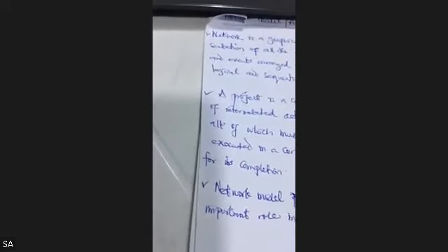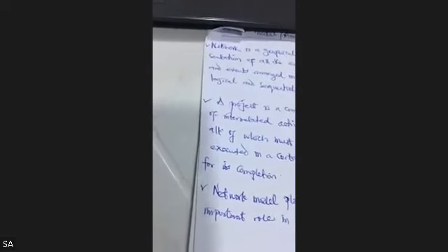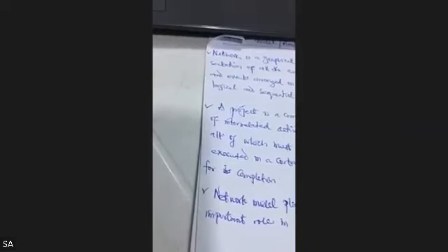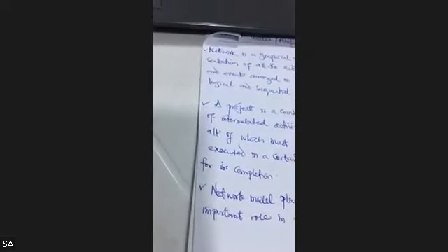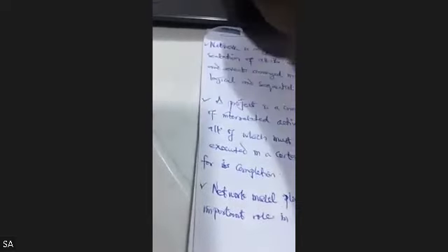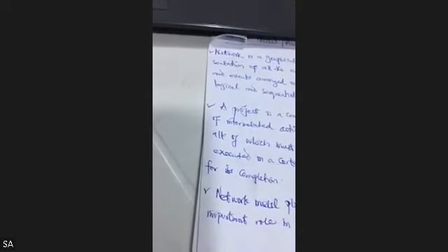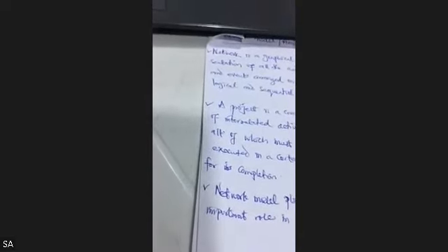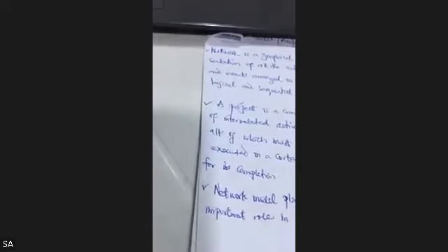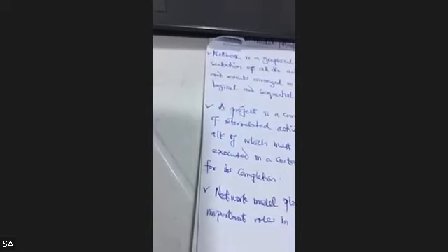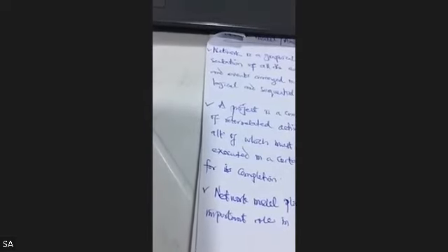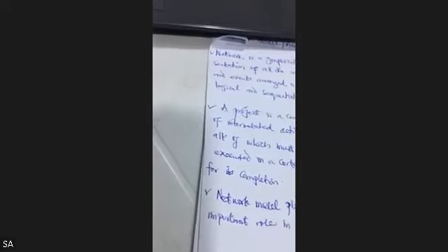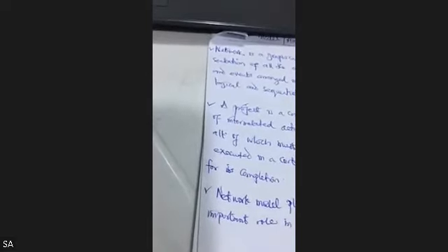For instance, for the question we want to solve tonight, we need to know which activities precede, that is the predecessor, which comes before, and which activity succeeds, that is, comes after. So this is very, very important. Then, next, very importantly, you draw the network. The network here is the CPM. You draw the network that is connecting all the activities. Take note of this. Each activity you are drawing or connecting should have unique event numbers. And most of the time, you use what we call dummy arrows.